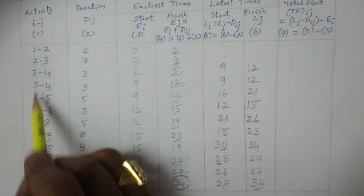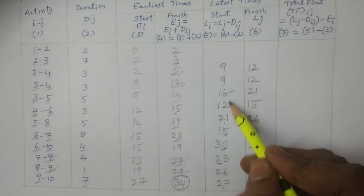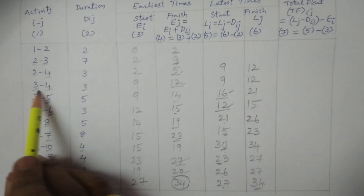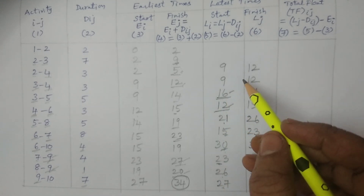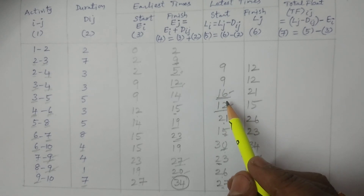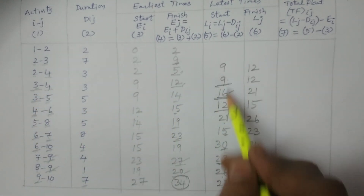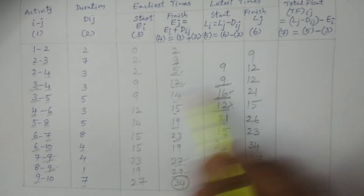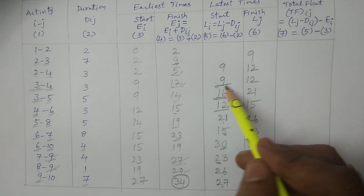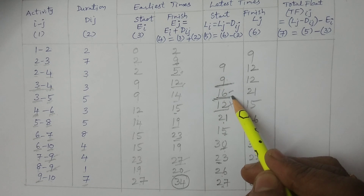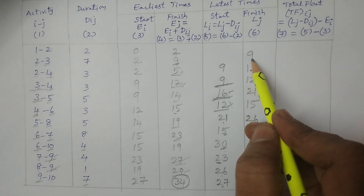For 2 to 3: event 3 has two connections — 3 to 4 and 3 to 5. L3 from 3 to 4 is 9, L3 from 3 to 5 is 16. You must consider the minimum: minimum of 9 and 16 is 9. So L3 equals 9. 9 minus 7 equals 2.